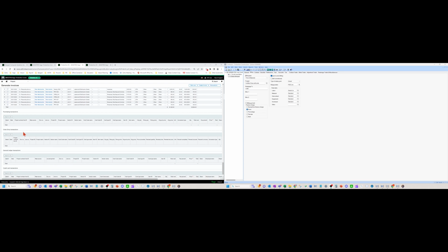And if I have like a direct cost entry that I want to put into the system to mark up, for example, maybe you charge some insurance charge to your job and you want to mark it up, or you just want it to flow through to the job as a cost, you can put that in as a general ledger transaction. And you can put a rate table on that GL transaction as well to mark it up. So really cool that you can do that in Intacct. Can't really do that in 300.